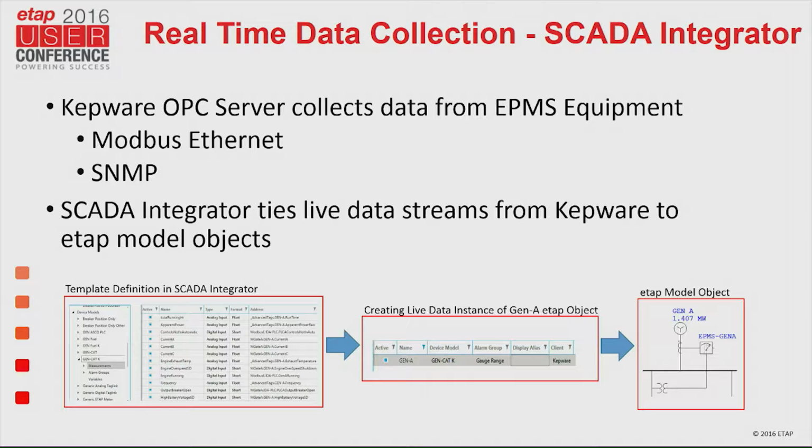So as soon as they turn power on the device, that's when we can go in and do all the configuration that you need, setting up IP addresses or node IDs, and then also checking out that the communication cable that they ran was properly run, not run too close to high voltage, all the things that bring in noise. So as soon as the power's turned on, that's our time to get going here.